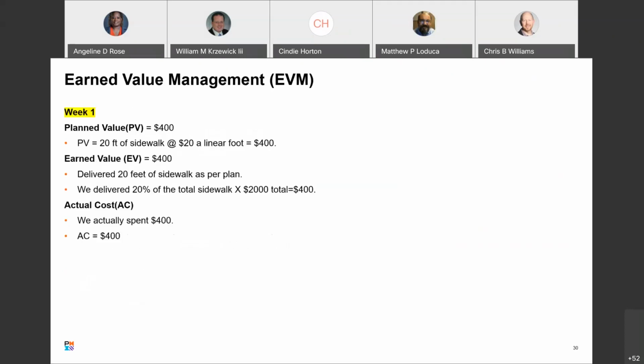All right, so now let's jump into it. So this is the actual role play, if you will. Well, not role play, but we're going to walk through each week, and we're going to see how we're doing. We're going to play it out into a scenario. So week 1, planned value, $400. We already knew that. Planned value is 20 feet of sidewalk at $20 a linear foot. Our planned value is $400.